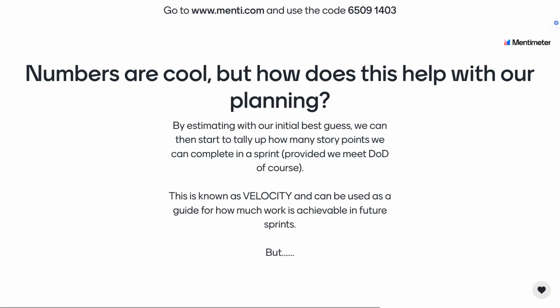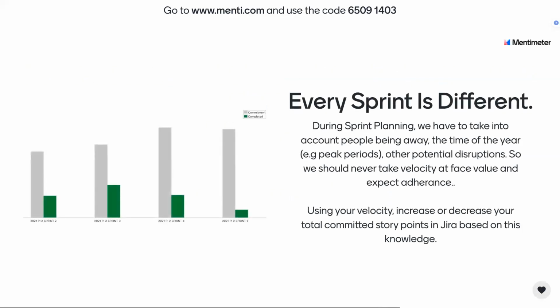If we're able to then go, how much work can we get done, right? This is our velocity. And that changes over time because every sprint is different. Sometimes people are away, they're sick, unfortunately. Something last minute has come from another vendor, or a P1 issue has blown everything out of the water. Everything can change. So we're never going to commit to what we say in a sprint, saying yes, that is exactly what we're going to do and it's never going to change.